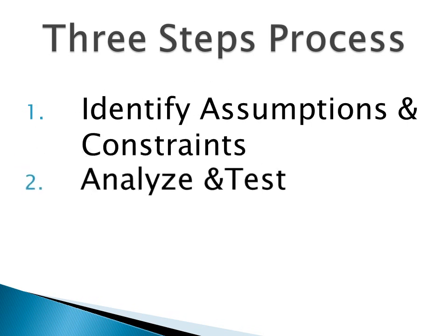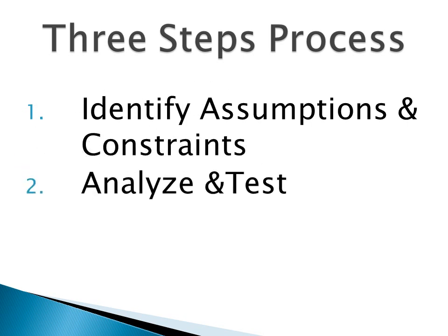The second step is to analyze and test the assumptions and constraints. Some questions suggested include: how important is this assumption to strategy success or failure? How valid or probable is this assumption? What are the odds and how do we know? If they fail, what is the impact? Is it diminished, delayed, destroyed? What could cause this not to be valid? And the third step is to act on them.